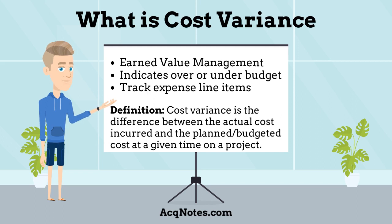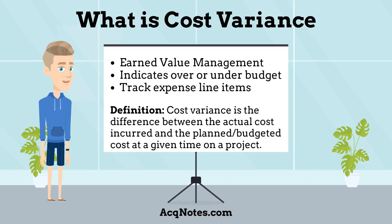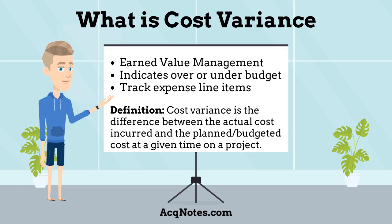Cost variance is used by the program manager and program personnel to determine how best to utilize their remaining resources. The definition of a cost variance is the difference between the actual cost incurred and the planned budgeted cost at a given time on a project.